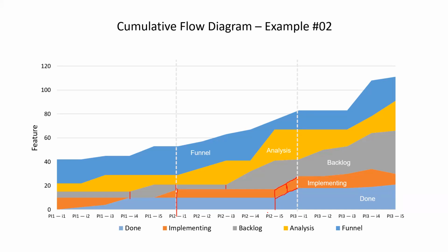Okay, then obviously, since we have some big WIP limit, there is a possibility that the team might be working on some XYZ issues for 1 or 2 days, or maybe 3 or 4 days. That means for 4 days we'll get a flat line. Nothing is there in the implementation as well as nothing in the done state. So how can we check from the graph that there is a bottleneck or some issue with the team? That is where the previous stage, where the WIP limit is not there, comes in.